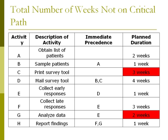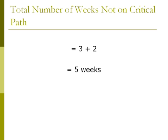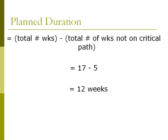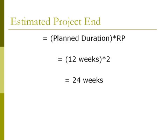Shown in red, activities C and G do not lie on the critical path, so the sum of their weeks will be subtracted from the total weeks. The total number of weeks not on the critical path is therefore five weeks. So, putting the two previous calculations together, we can find the planned duration, which is 17 minus 5, or 12 weeks. Now that we have the planned duration, we can calculate the estimated project end: 12 times 2 is 24 weeks. The project is estimated to last 24 weeks, which is actually twice as long as expected based on how long it took for the first three activities to be completed.